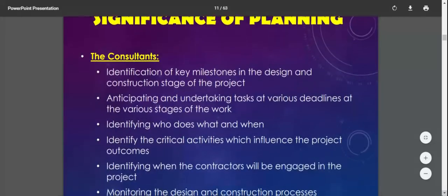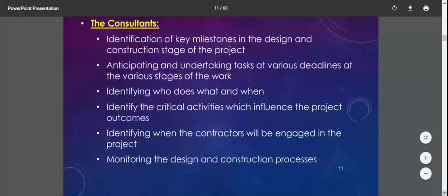In terms of the consultants, they identify key milestones in the design and construction stage of the project. The consultant should anticipate and undertake tasks at various deadlines at the various stages of the work, identifying who does what and when, identifying the critical activities which influence the project outcomes, identifying when the contractors will be engaged in the project, and monitoring the design and construction processes.